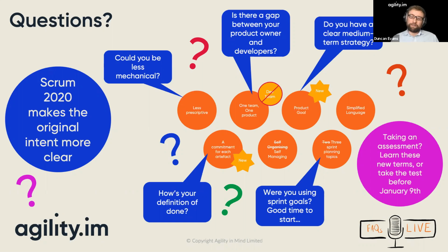Interesting, yeah. So I think this is probably one of those questions that's around the fact that Scrum is a framework. So Scrum defines certain accountabilities, the 3 accountabilities that are there: the product owner, the Scrum Master, and the developers. Now, there are certain specific things that they are definitely accountable for each. Product owner manages the product backlog, the developers are self-managing. They decide what they're going to do, how to implement the requirements. They're accountable for providing estimates, for example. So there is a certain base layer of accountabilities which is defined by the Scrum framework.